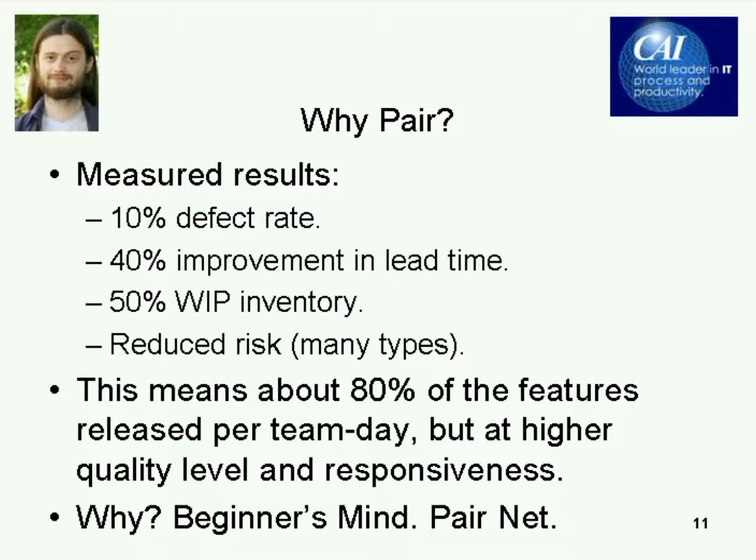When you are actively pairing, every idea goes through several variations in people's heads, bounces back and forth between the two involved people before it ever gets implemented. This means that a lot of improvements happen before the first writing of the code. Also, you have a copy editor sitting right there next to you when everything is written. So there are fewer just transcription error bugs. Result is about 10% of the defect rate.